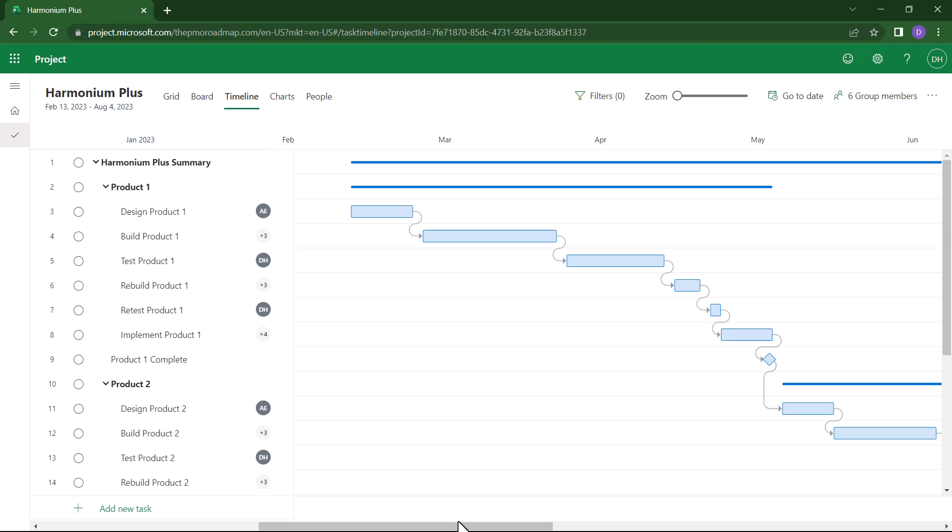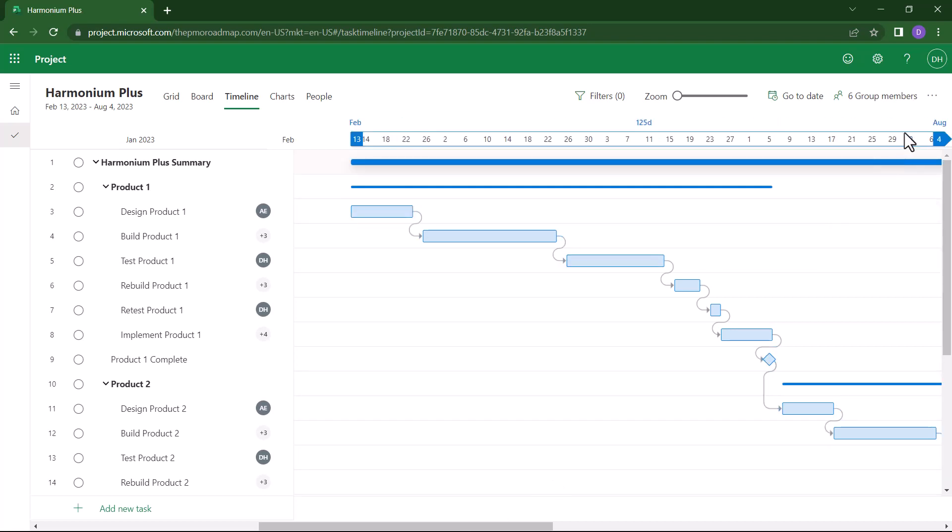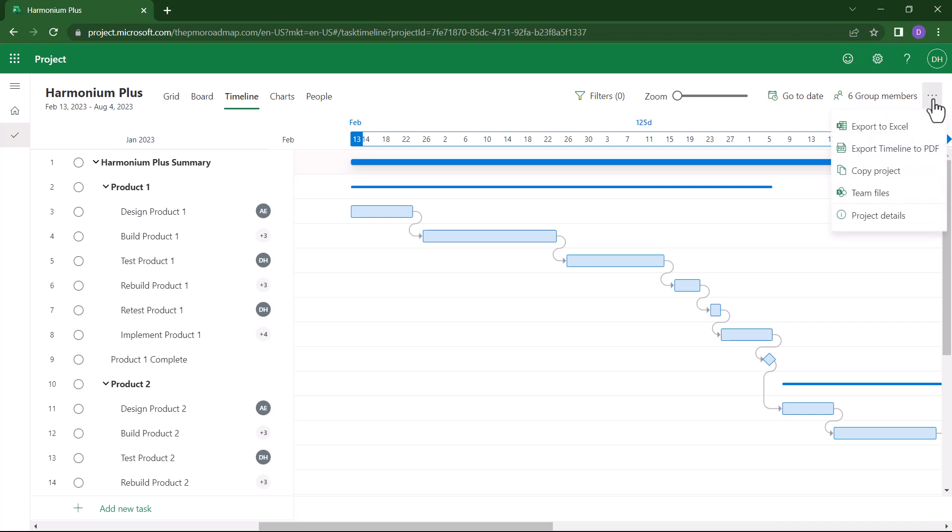So display the timeline view of your project. Then, in the upper right corner of the screen, click the More Actions or dot dot dot button. And on the menu, choose Export Timeline to PDF.